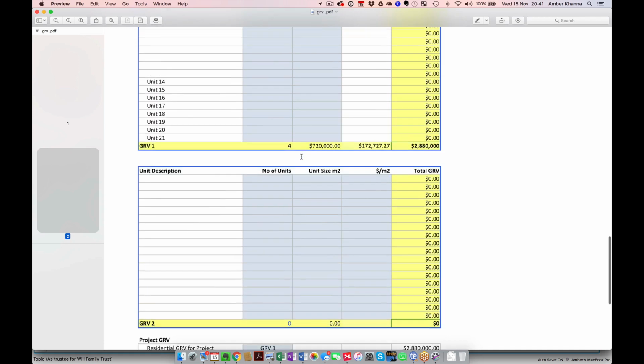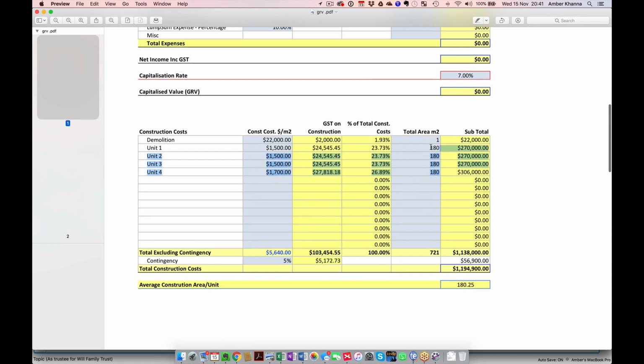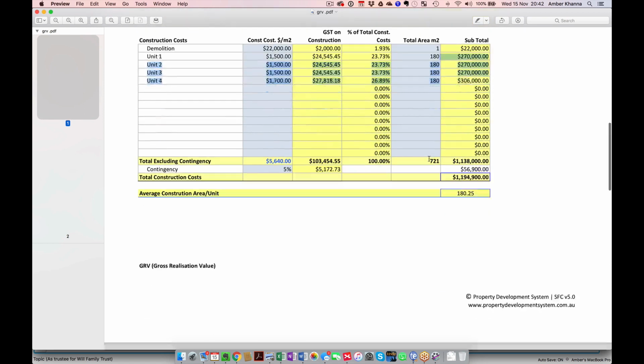Okay. And the 180 for a 4-bedder, does it include garage, or is the garage additional? Get the actual built area space. So they will give you a breakdown of the garage, first floor and ground floor, and balcony if there is one, and private open space. So there are 5 things that they'll break it down into. Private open space, garage, first floor, ground floor, and balcony if there is one. So it's usually about 5 different, unless it's a 3-story townhouse, so there'll be a second floor there as well. But if not, that's what it will be.